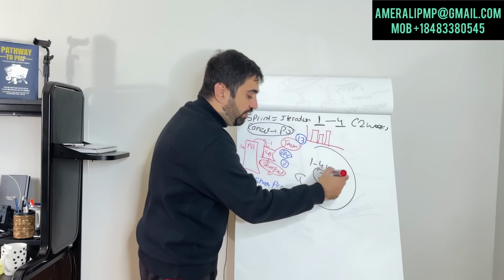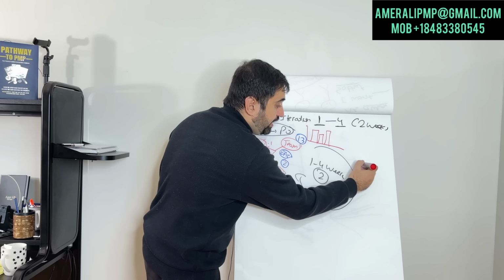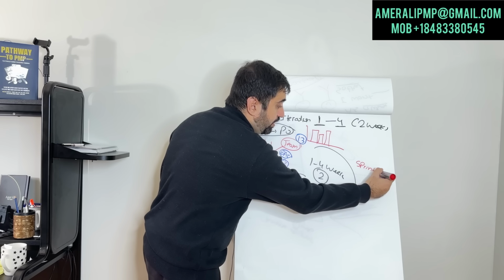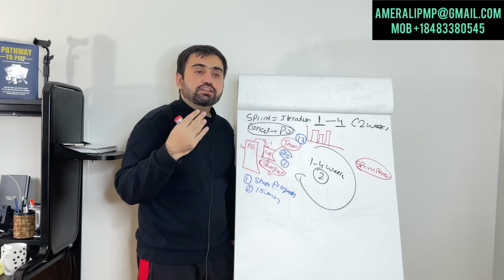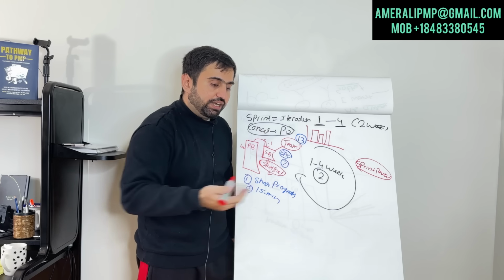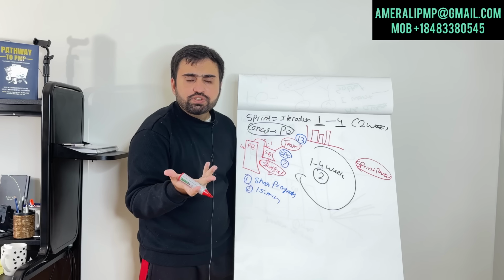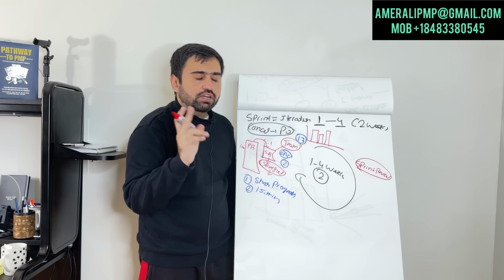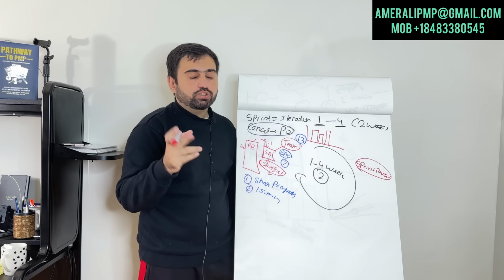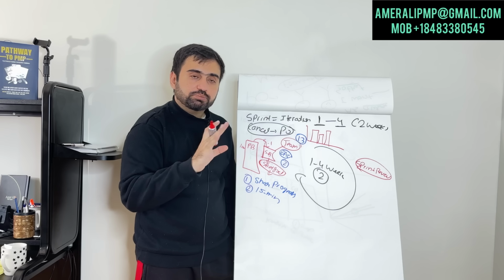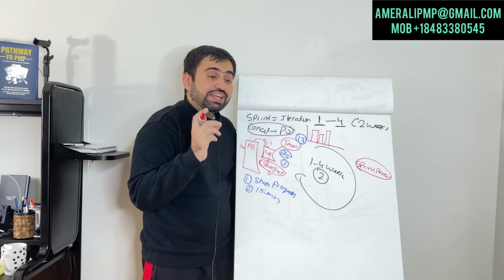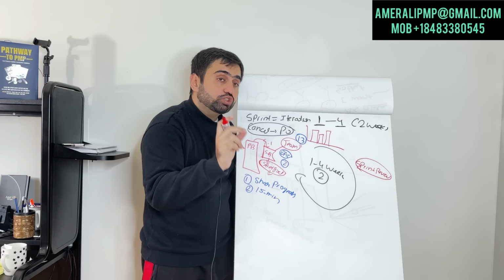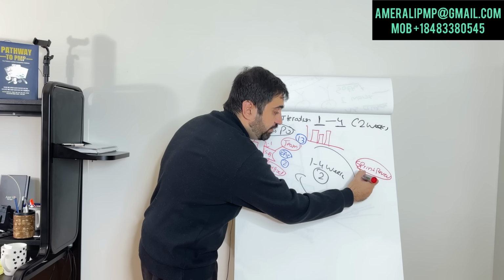Then once the entire work is done, then happens sprint review. Sprint review is basically, when does the sprint end? When the entire sprint is over, after 2 weeks. Not when the work is completed, not when somebody says let's do it. No, when the time's up, sprint is over. So after 2 weeks, the client will come, product owner will come, team will only show those user stories which are 100% completed.